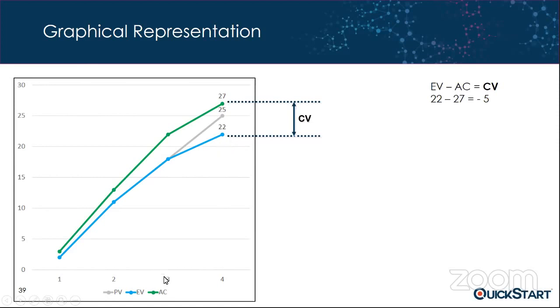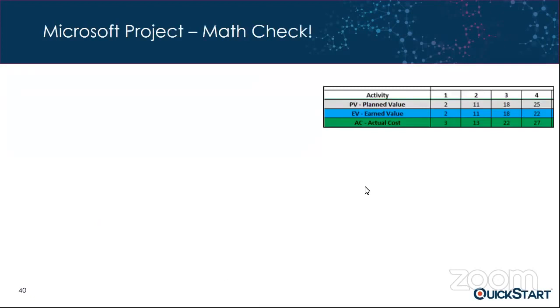So in this view, you can see your planned value, which was your original baseline plan, your actual cost for your project so far, as well as your earned value. This is what you've actually delivered, basically what we've actually completed on that pipeline to date in terms of dollars. Then you can see the variance: our cost variance is depicted here, our schedule variance is shown here. There's our formula kicking in, and there's our total variance, which is that difference there. So if you are using earned value and you understand these key earned value management metrics or performance measures, you could easily pull this information together and know where your project is at. But hang on a second.